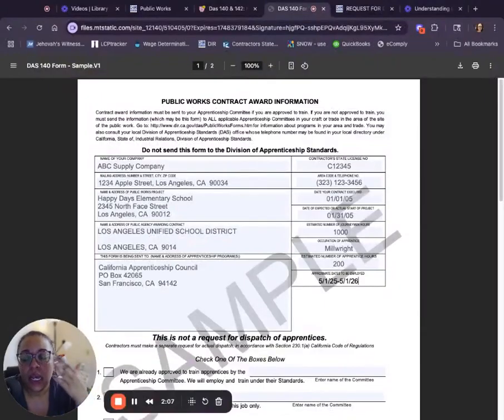What we're finding is that sometimes we'll put down that exact range, and then there'll be an audit where there was perhaps a change order and the subcontractor agreed with whoever they were contracted with to do additional work. So their time on site extended. And now it looks like, even though this says approximate, because that window of time that they worked is so far different than what they put down, it can look deceitful to the auditing agency. So we just try to do a year, unless we know for sure they are just going to be there for that certain window of time.